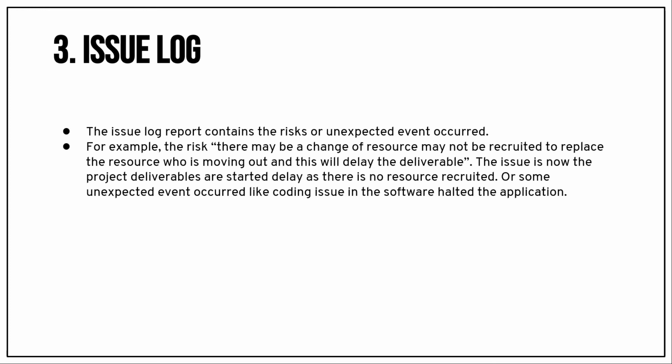Now we need to understand the difference between risk and issue. The risk is that we are anticipating an uncertainty will occur in our project. The issue is that the risk has occurred, so we have started facing the problem.